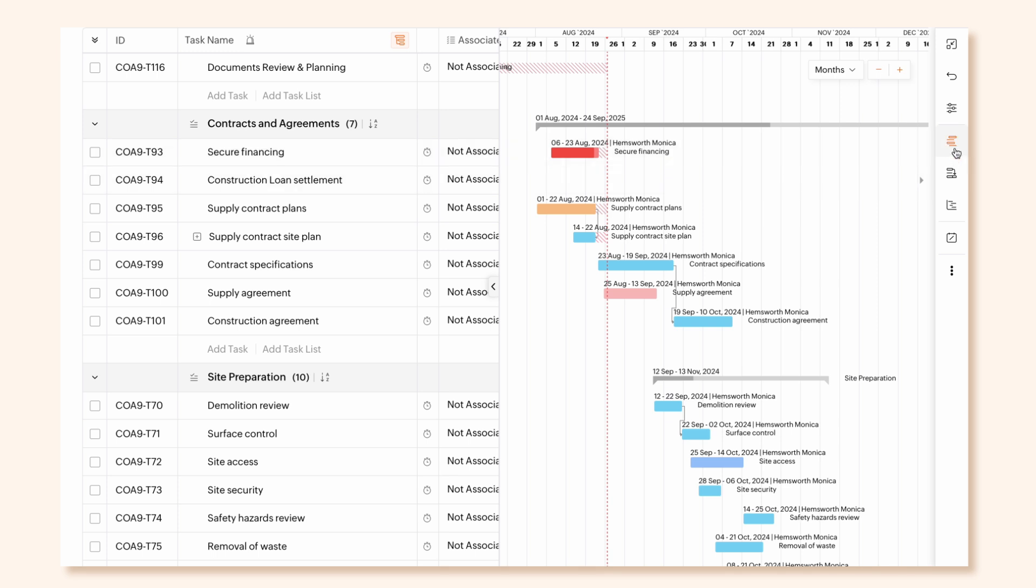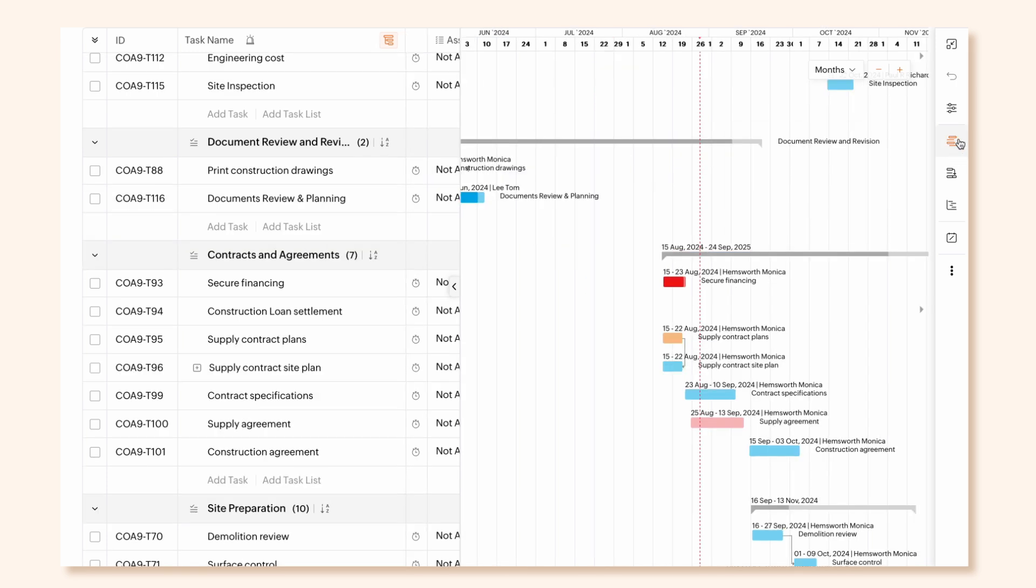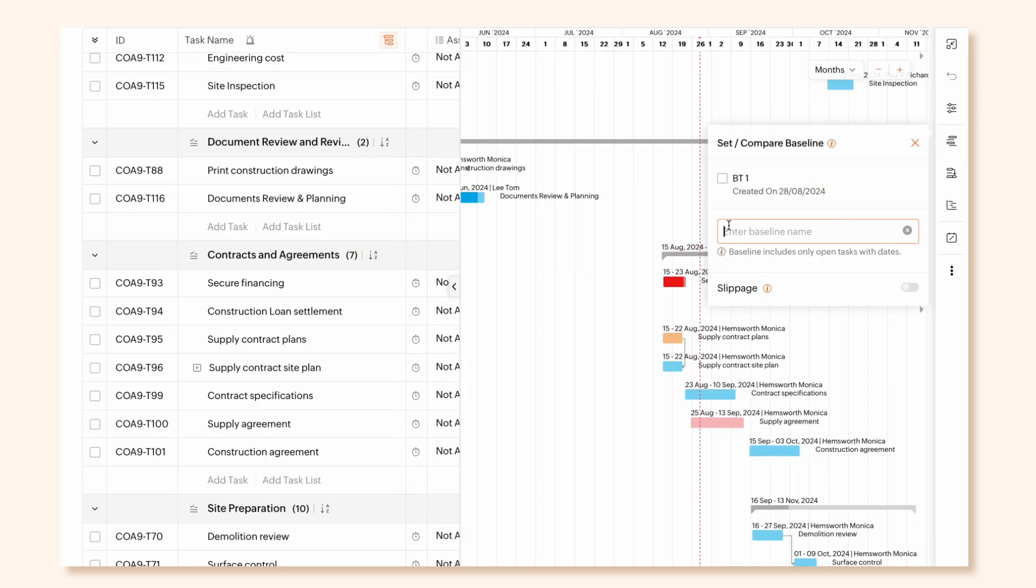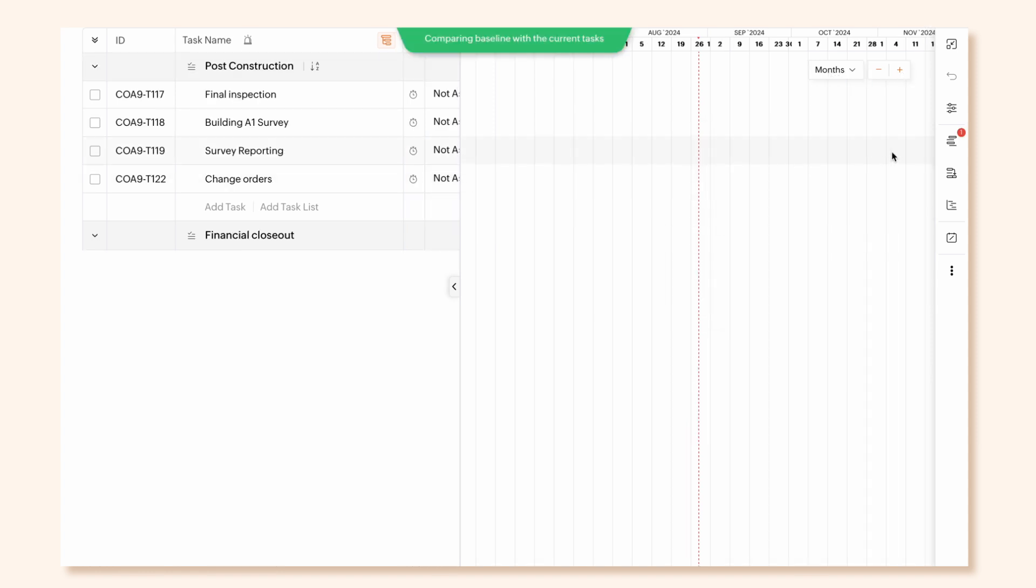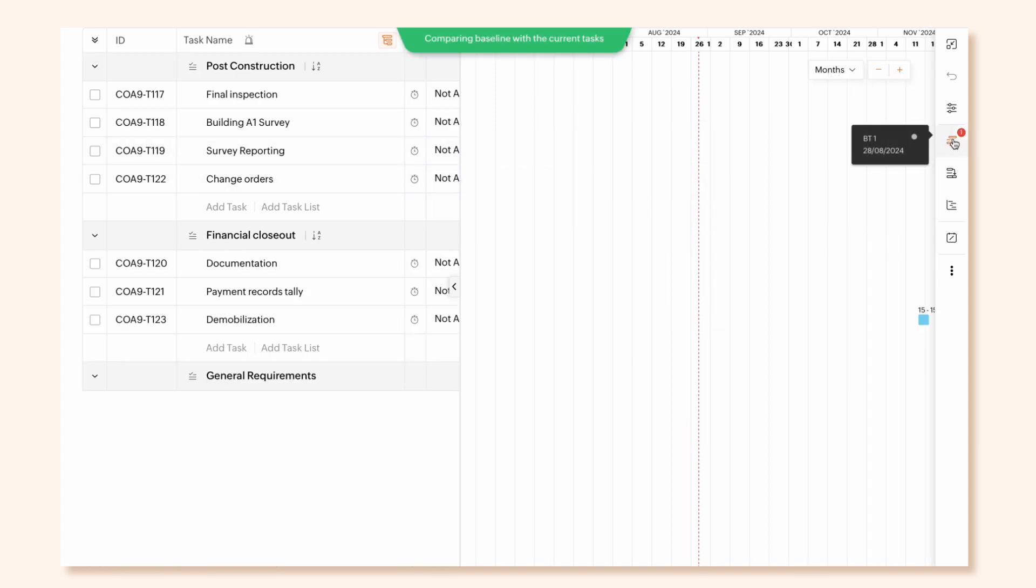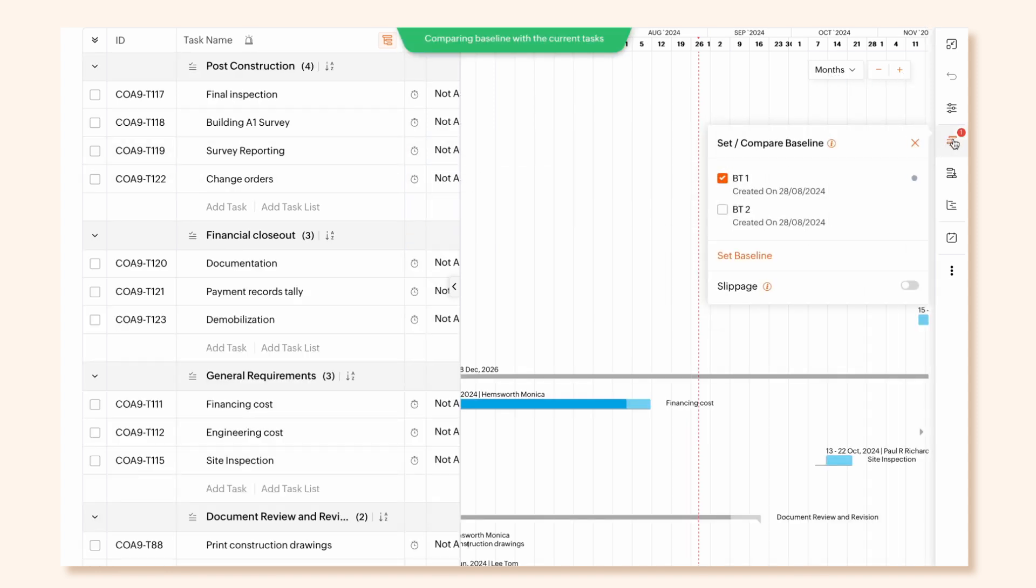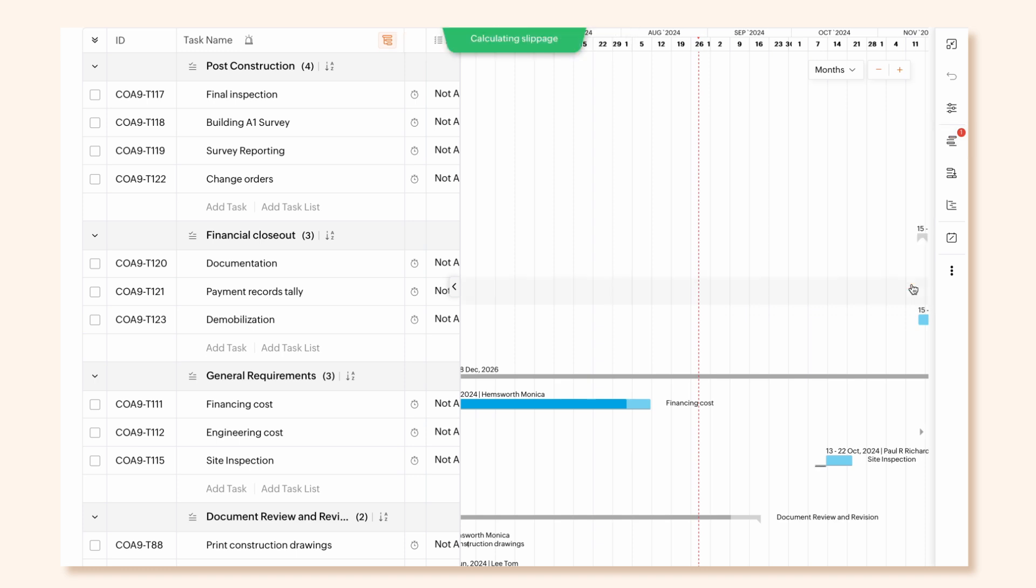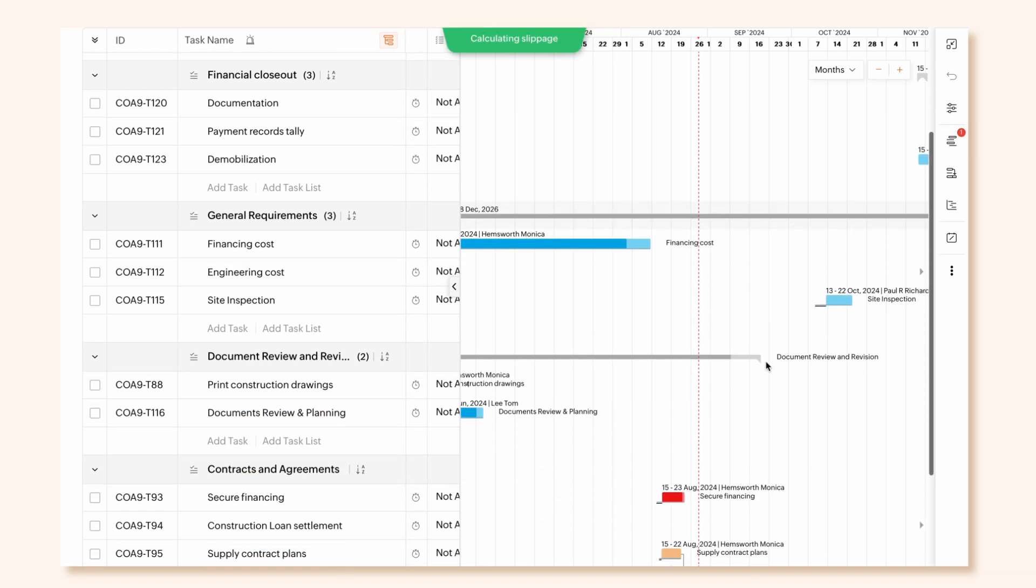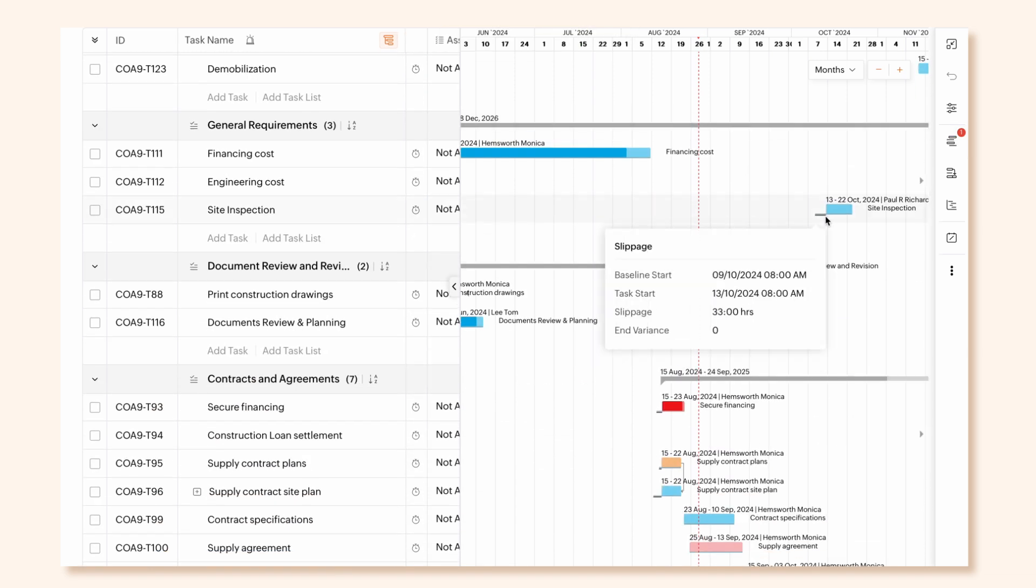Baseline helps track the deviation from the original plan, find bottlenecks, and schedule the tasks to align with the new project timeline. It is represented with a gray line. Slippage tracks the tasks that haven't started yet.